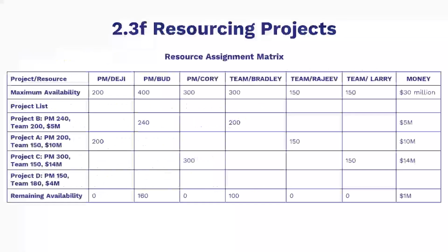In the resourcing projects slide, I introduced to you an example of a resource assignment matrix, which emphasizes the fact that leadership should start assigning resources from highest priority project down until resources become limited. Assigning resources requires a prioritized project list, such as the one shown in the example in the slide, a list of resources and how much of each is available, and an estimate of how much of each key resource each project will need. For simplicity, organizations often plan for a fiscal quarter.